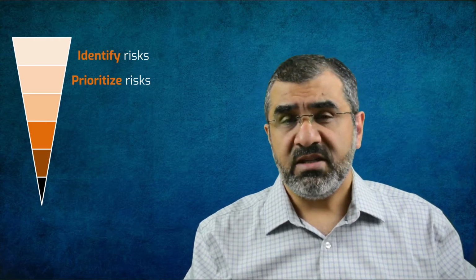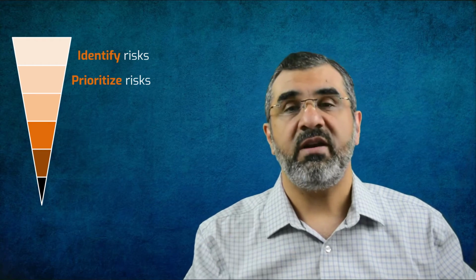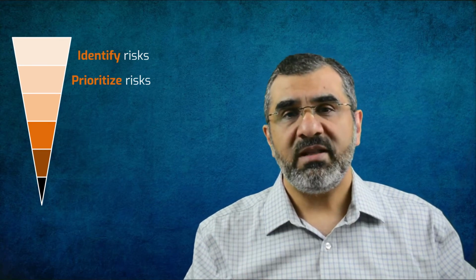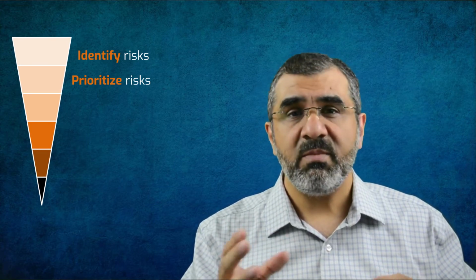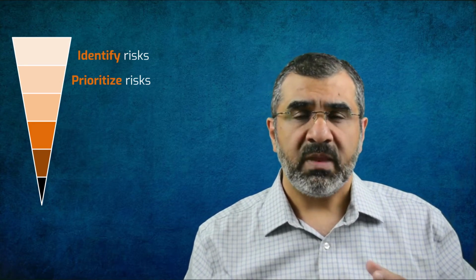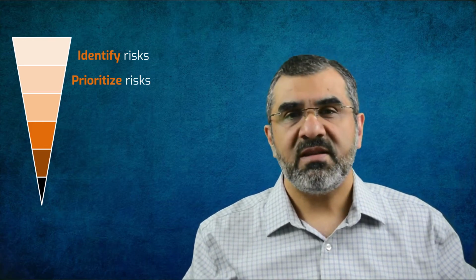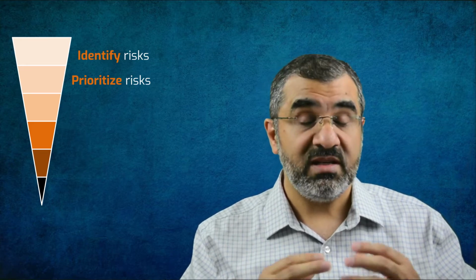But many organizations have standard ways defined for the very purpose of risk prioritization. The most common method, which is addressed in detail in the PMBOK guide and which is the one I have seen practiced widely, is the PI matrix method. The project team uses a combination of 2 factors, probability and impact, to decide risk priority. PMBOK mentions several other parameters, though very few of those I have personally seen in use.